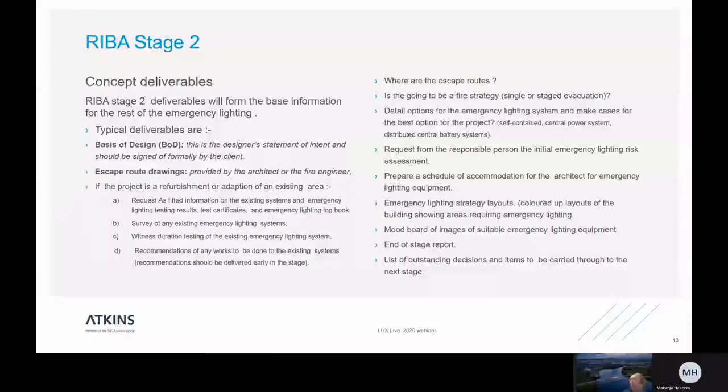Now, what I would say is I'm using the RIBA stage report method here, and this is really appropriate for medium to large projects. Small projects, say under 20 luminaires and signs, might not have it, so a lot of these stages may well be condensed into a single stage, and all that information needs to be provided. But the information that you require is no different from a small project to a large project.